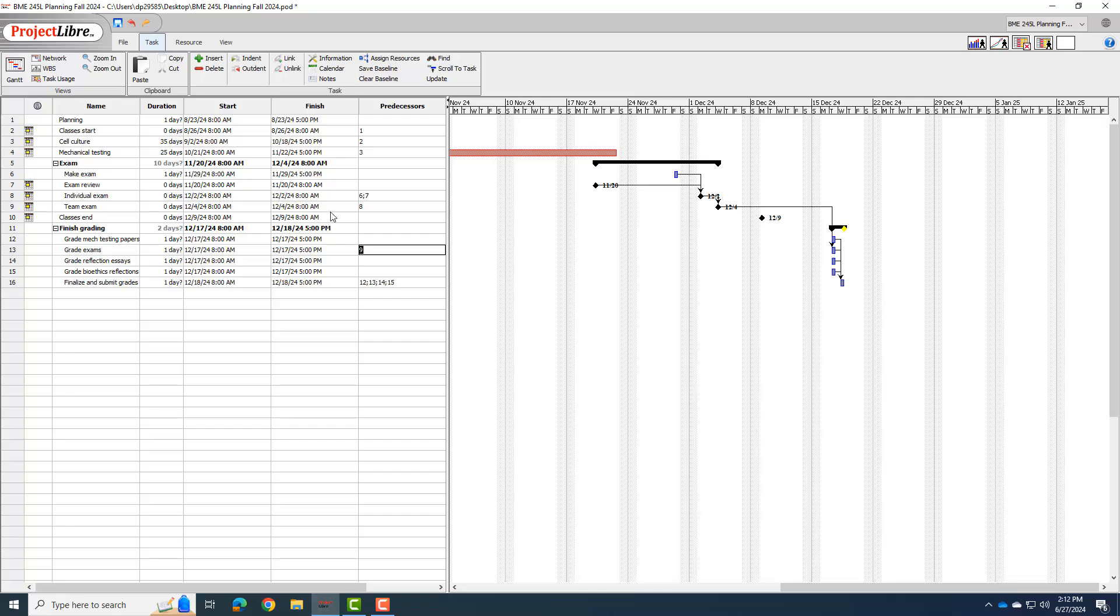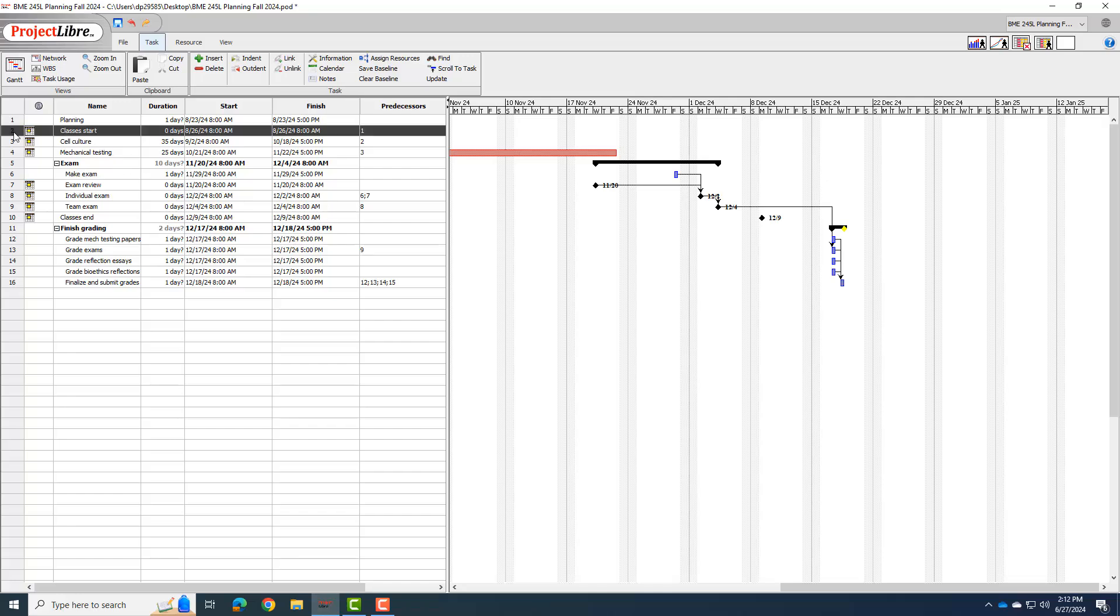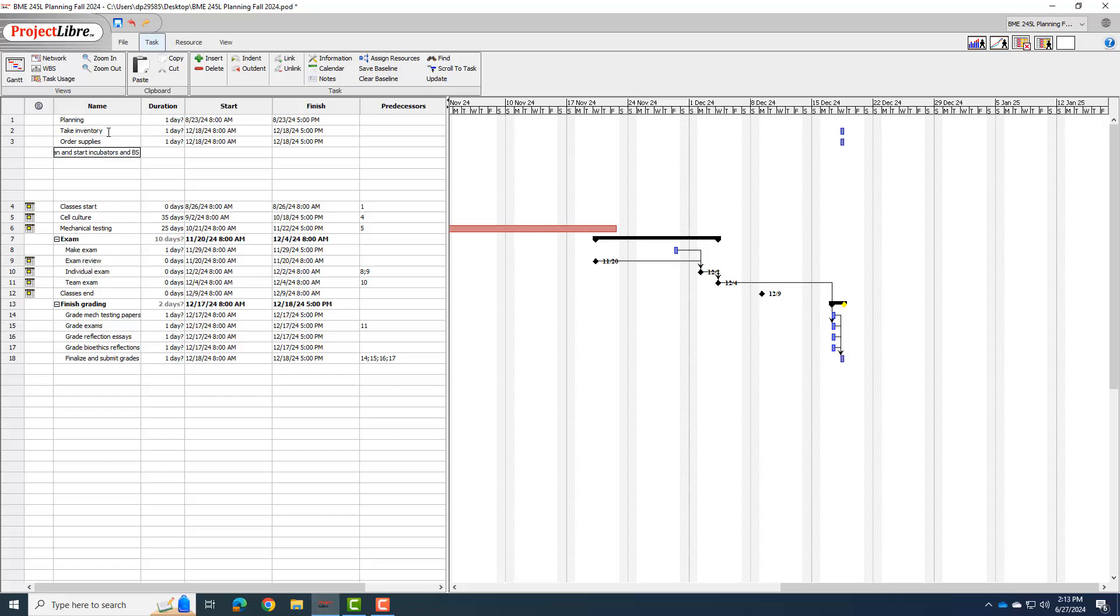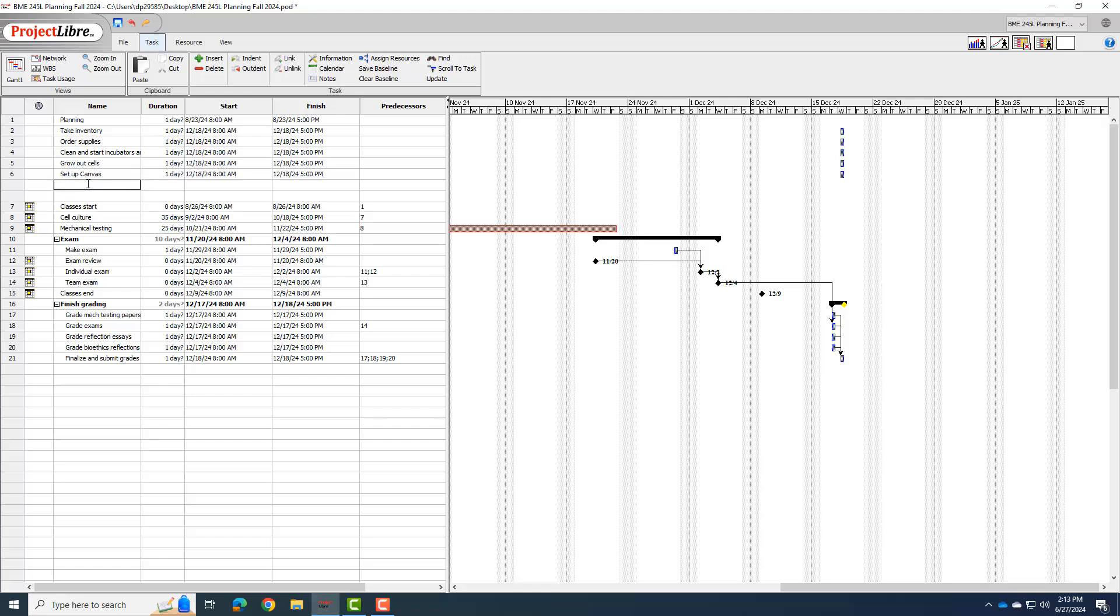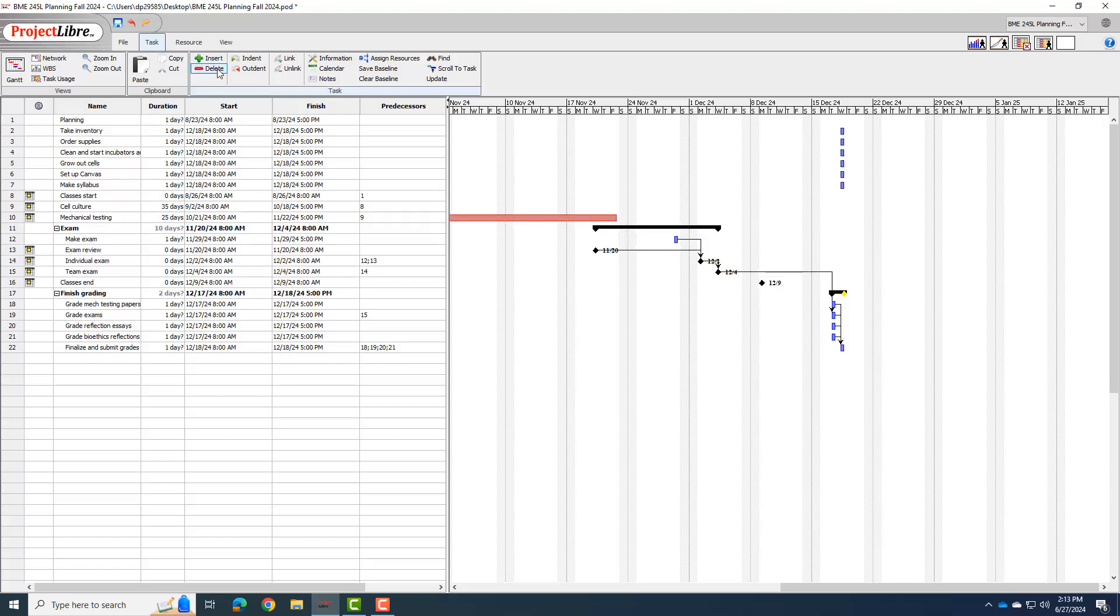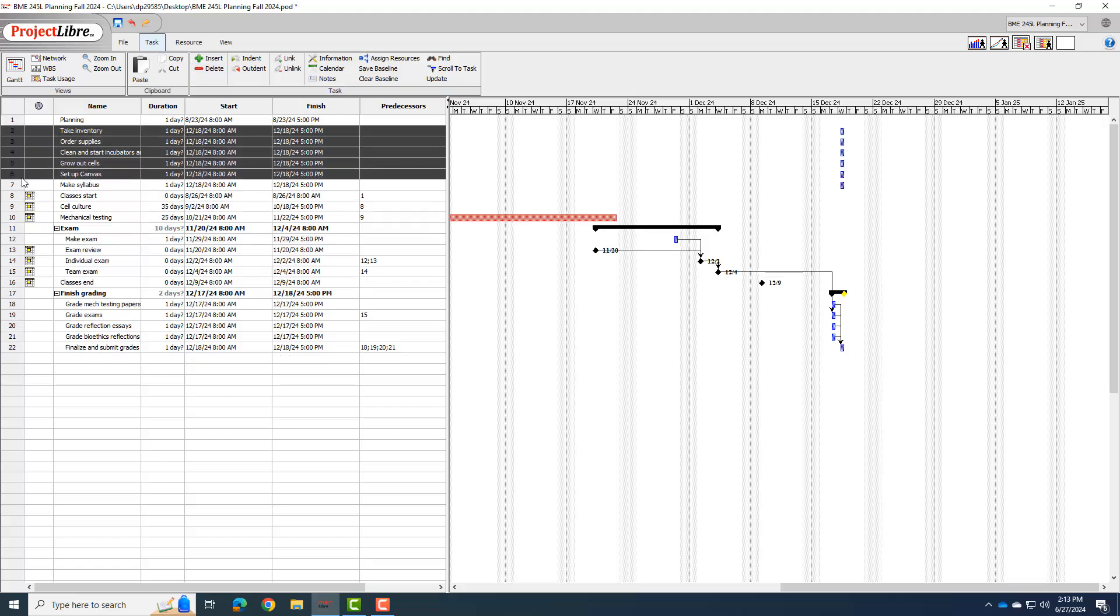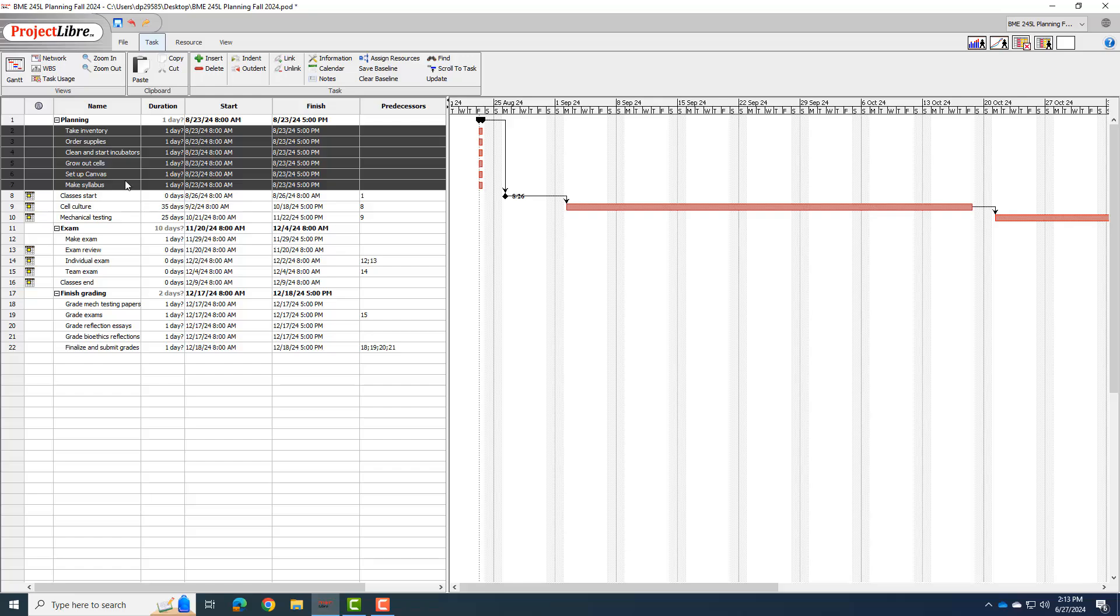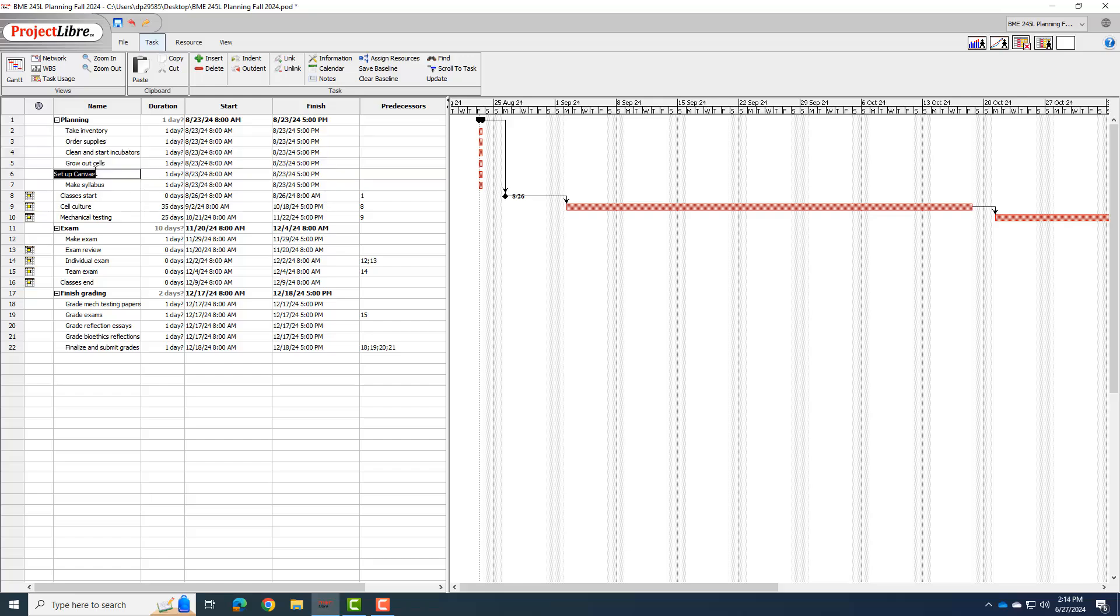And so I'm going to try to add a lot of the planning under here. So under planning, I'm going to insert a bunch of lines. I'm not sure how many I'll need yet. So one of the lines is going to be take inventory. The next, after I do that, I'll have to order supplies. I'll have to clean and start the incubators and biological safety cabinets. After I do that, I'm going to have to grow out some cells. I also need to set up canvas. I need to make my syllabus. I think that's about it. So I can delete this row. But all of these are going to be subtasks under planning. So all those will need to happen before classes start.